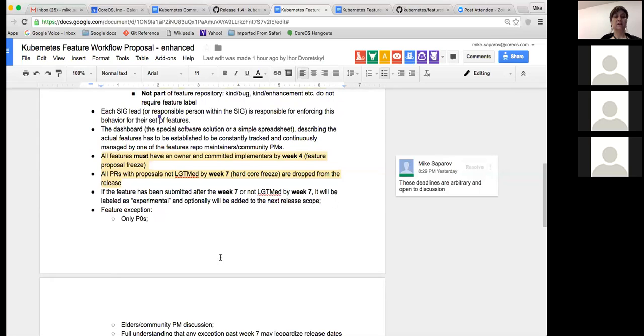So I would anticipate that week 7 lines up with feature complete: coding should have stopped and we should have just done bug fixes. So we probably want the proposals in earlier than that. No. As it says in the comment, those are arbitrary weeks picked for 16-week cycles, so shorter release cycles should adjust those weeks correspondingly.